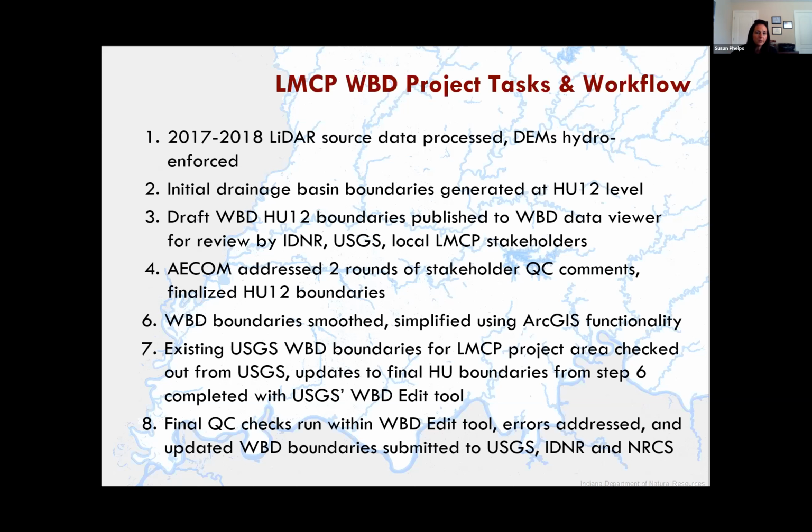So there were a series of 3 meetings that were held with the local stakeholder group. That was to inform them about the project, to gather feedback from them, and have them review those final boundaries. And I will say that we did a lot of that on just the geometry of the WBD boundaries themselves, trying to finalize the geometry of those features as best as possible before actually doing any updates with the official tools.